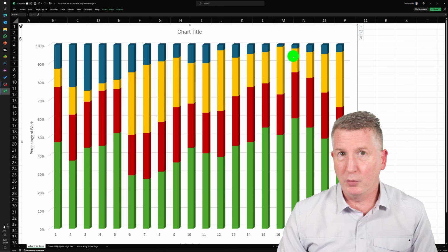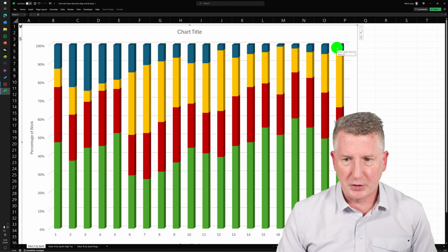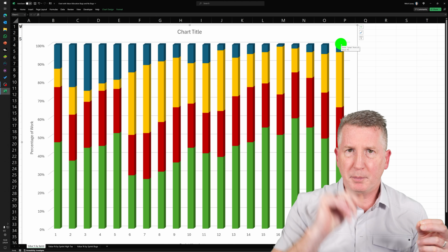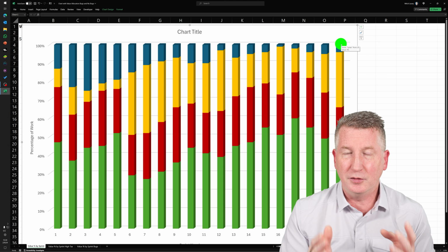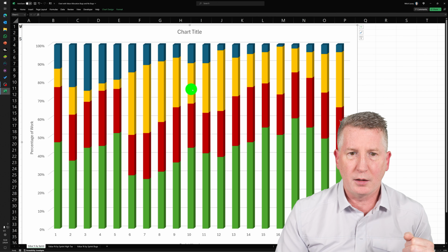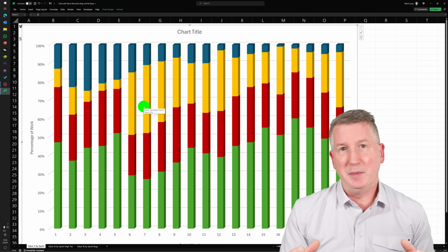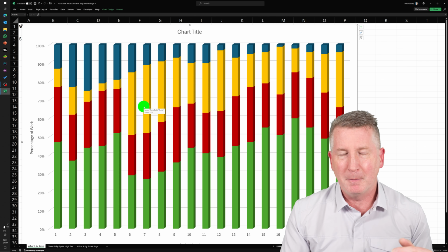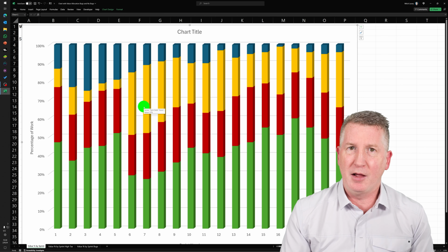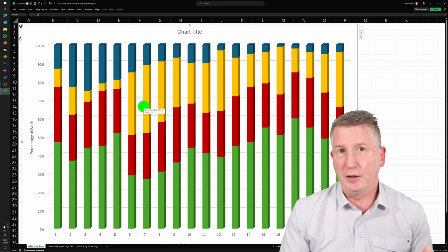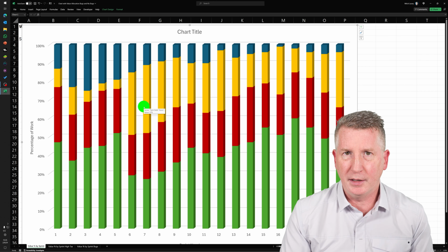And this is downloadable, and you can see the links in the description. What we see here is the green going up in sprint 1 through 5, and in sprint 6, notice how the technical debt got a lot bigger. Right here, the technical debt got a lot bigger. This tells me that the team was probably shortcutting their definition of done a little bit and not acknowledging it, and now they gotta pay the bill, right? The bill is due, and they need to pay that technical debt bill. And you can see the corresponding green stuff going down.